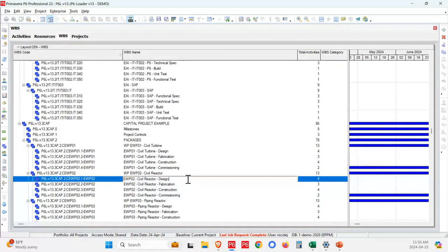So what the loader does, it has something that lets you unclash them. So if you try to load 2 WBS nodes, it will assign it, just like Nicole did manually, a -1 and -2 to each WBS node where the name is a duplicate. Because that prevents you from loading it. The idea was we wanted to do the maximum that we could so that you can load a file without errors.